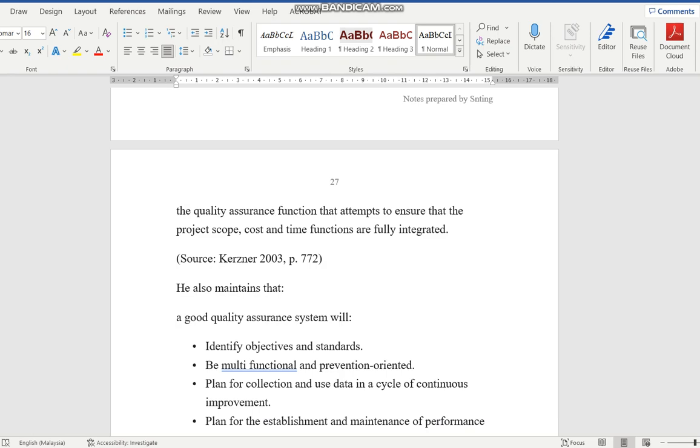So resources, like I said, we mainly focus on material. If the material comes in, you do checking, or let's say you specify it's actually approved by CIDB, then do you do any random checking? If you do random checking, on things like timber, roofing, steel, concrete, now we do some random checking on it. So if we specify random checking here, that means we are actually planning in terms of resources, you see.